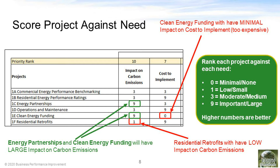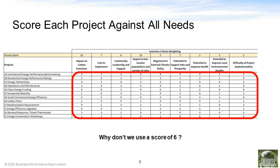In this example, the team has determined nines for the two categories of energy partnerships and clean energy funding under the column of impact on carbon emissions — meaning those two projects will have a big impact on reducing carbon emissions. Alternatively, they did not think that residential retrofits would have a big impact on carbon emissions, so they gave it only a one. On the next column, they also felt that clean energy funding would have very minimal impact on the cost to implement category. What this means is that a zero is bad — the cost to implement would be very large, bringing it down on the list of importance. This category could be renamed to something like return on investment or low cost to implement. For each project listed you must go through and score it either zero, one, three, or nine on each of the stakeholder needs.